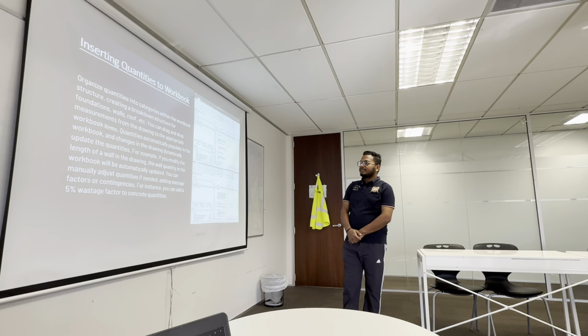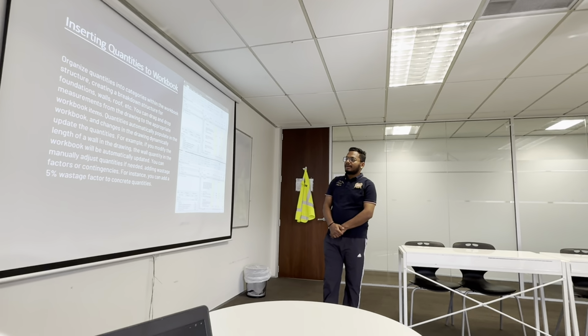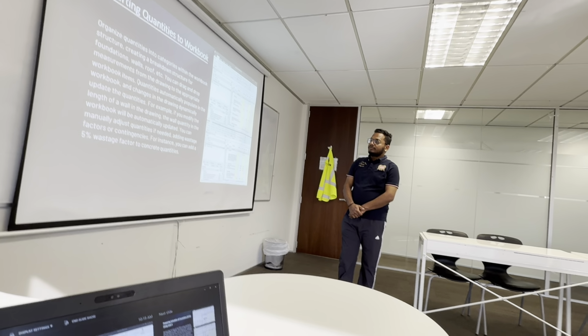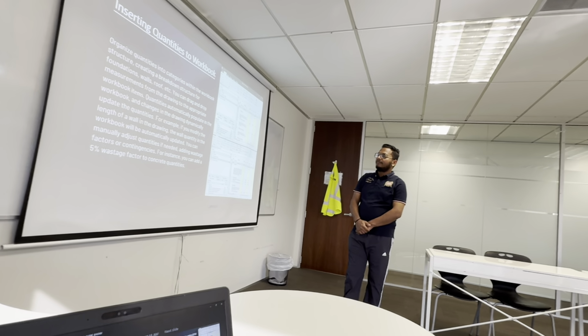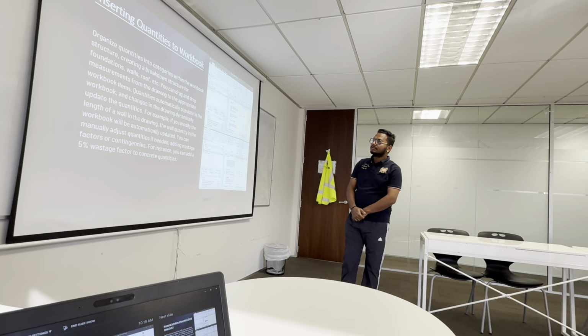You can manually adjust quantities if needed, adding waste factors or contingencies. For instance, you can add a 5% wastage factor to concrete quantities. So next one.